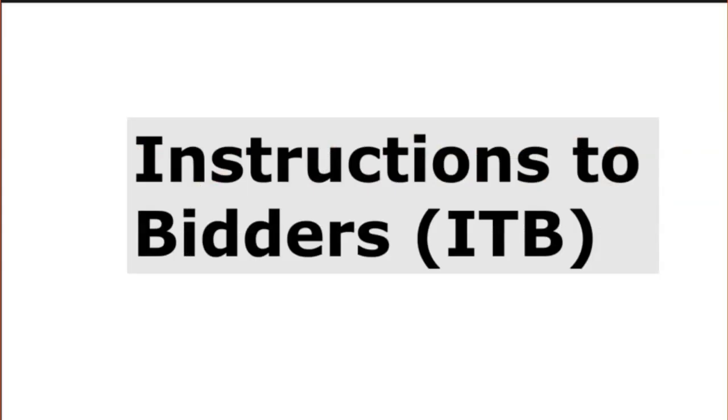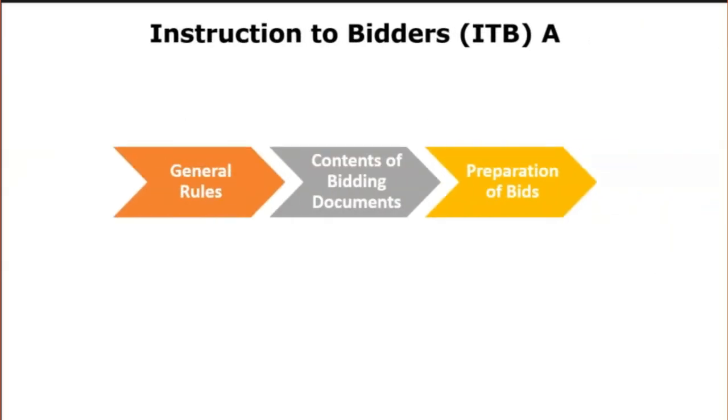Instructions to bidders is one of the documents we are going to look at. The instruction to bidders is a standard employer-specific text derived from the National Procurement Law and secondary regulations. It lays down the standard rules governing the competition game and how the bids must be prepared, and the deadline for bid submission. Such standard text facilitates review by auditors and supervisors.